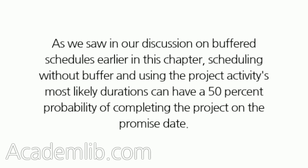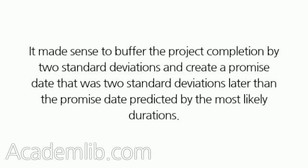As we saw in our discussion on buffered schedules earlier in this chapter, scheduling without buffer and using the project activities' most likely durations can have a 50% probability of completing the project on the promised date. It made sense to buffer the project completion by two standard deviations and create a promise date that was two standard deviations later than the date predicted by the most likely durations.